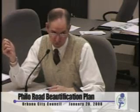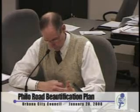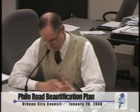Well, what we did is we took a certain strip. That streetscape multiplier just reflects the cost for the entire corridor from Florida to Colorado. These costs here really are reflective of a 450-foot length. And if you want to know why it's 450, Garrett would have to answer that question. There's different ways of doing this estimate, and at the bottom line it reflects the entire length between Colorado and Florida. And so that multiplier just means it's a 1,250-foot length between those two intersecting streets. 450 times 2.7 is 1,250.